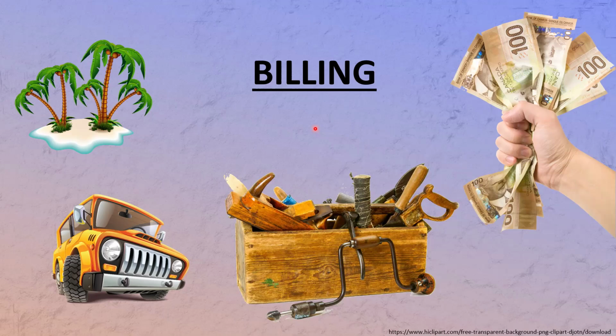Other things, bill them right away, because towards the end of the project, you might find some funny things. They say, oh, you know what? Can you wait maybe a month or so for the payment, because I had to pay all the other trades. And it just so happens that that is not your problem. But what are you going to do? So bill them right away while they still have the money.